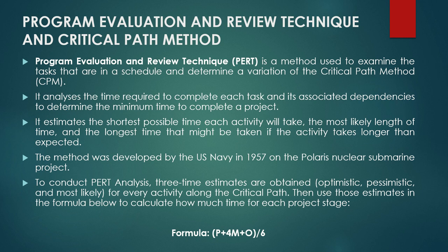Without assigning time in PERT, program evaluation review technique, there is no use, right? This is the basic difference between a flowchart and a networking technique. In a flowchart, we do not assign time to each activity, but in PERT, we assign times to all the activities and their associated dependencies to determine the minimum time to complete a project. Here they also identify the dependency of one activity on another.